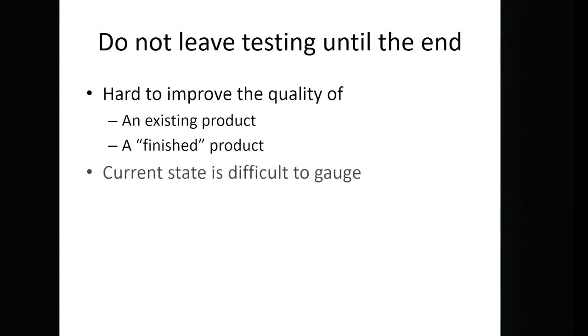If we leave testing till the end, then we don't really know where we are. I mentioned this a couple of times last week in the TDD lecture: if you have a load of tests and they're all passing, and you know which bits of the backlog you've done, then you can be sure that those bits of the backlog really are done, because the tests are saying that the code is finished. So testing in that sense becomes either a progress meter or a probe.